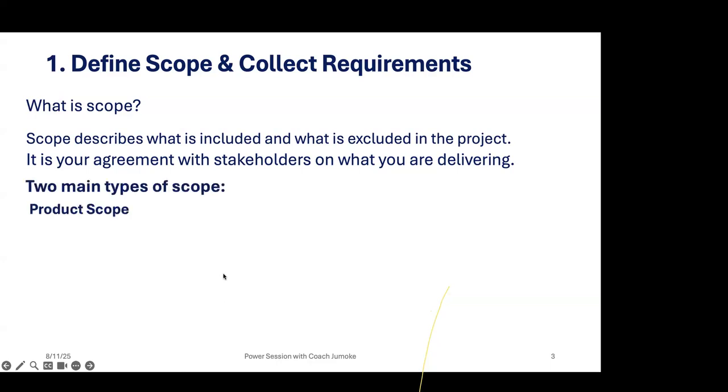And there are 2 types of scope. You have product scope, you have project scope. Product scope refers to features and functions the project would deliver and would have to satisfy. I have an example that I usually use: if you are asked to produce a 500 ml bottle, for the water we buy, and one of the product requirements or features is that when you turn the cover 360 degrees twice, it must come off completely. So that becomes a feature or a function of that bottle.